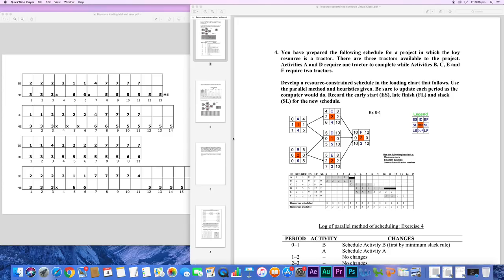Combinations in scheduling resources can be so many that even mathematical modeling is not convenient. Even on small projects, combinations can be overwhelming. That's why in real life heuristics are often used.